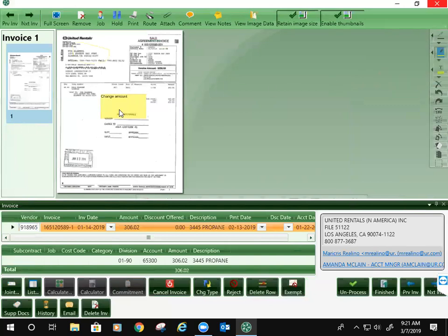One thing to keep in mind when you annotate something and you say I changed the amount: these annotations, so the text box, the highlighting, the writing on the invoice, all of those annotations are not permanent, meaning they can be deleted, and they can be deleted by anybody in the approval chain. So if you put this box on here, the next approver says, okay, you changed the amount, I don't need this box anymore, I'm going to delete it and remove it. That can happen with all the annotations. Comments stay permanent, and comments always stay with it.